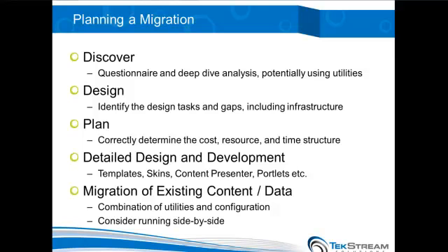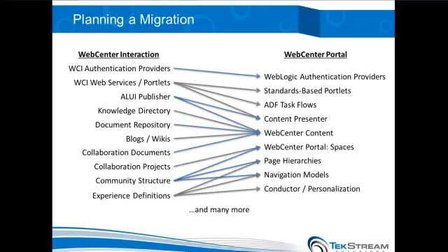So you do that initial discovery, and then you move on to a high-level design. That's when you take a look at everything you have. Where are the gaps, including the infrastructure gaps? This certainly could be a situation where they've been running it for some time. Take a look at the server. There might be some questions there about whether this is what you want to continue to run your portal on, et cetera. Find those gaps, and that's when we go back to this arrow-type sheet.